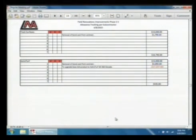We have the Oz Engineering that would eventually be used out of that, and then there is probably one other change, around $25,000, hopefully under, and that's for the pump station. That connects to the sewer line that's near Rockefeller, and we do have some minor bedrock. We did a couple cost estimates if we wanted to go with the current footprint and just chisel out the few feet of bedrock, and it should be within the ballpark of about $25,000. That would be the last thing that would be below grade, which is usually where you find a lot of your contingencies being used. So knock on wood to this point.